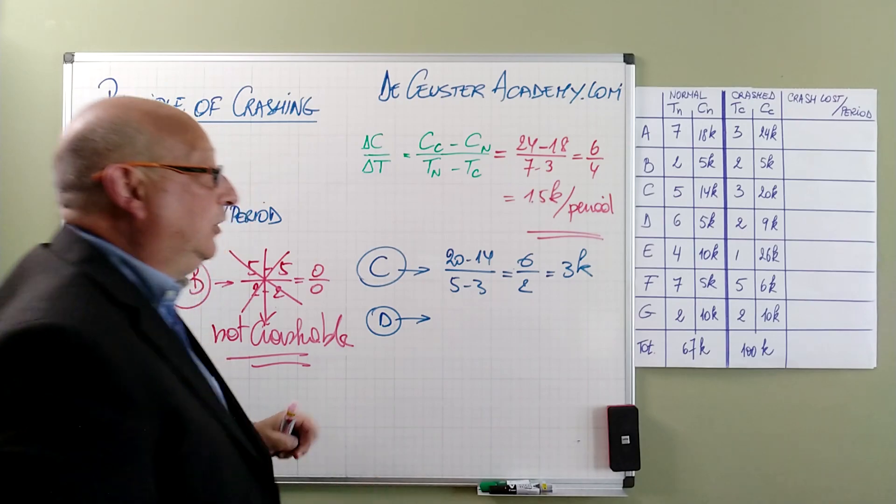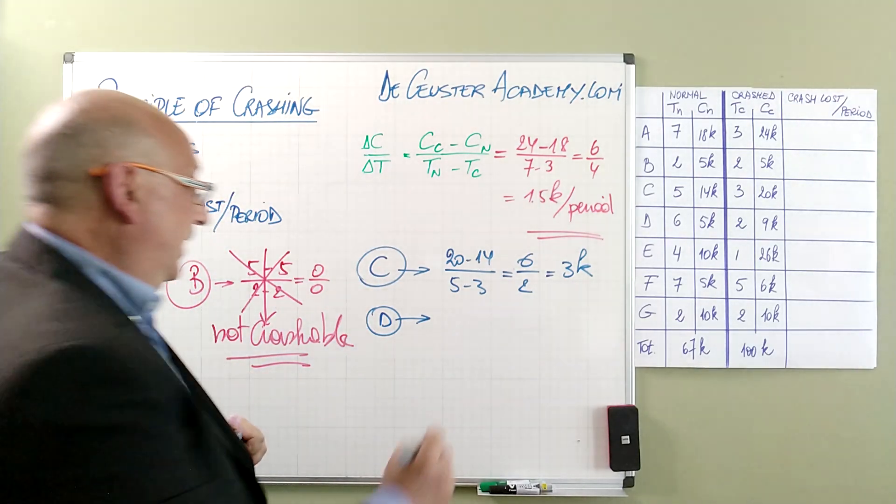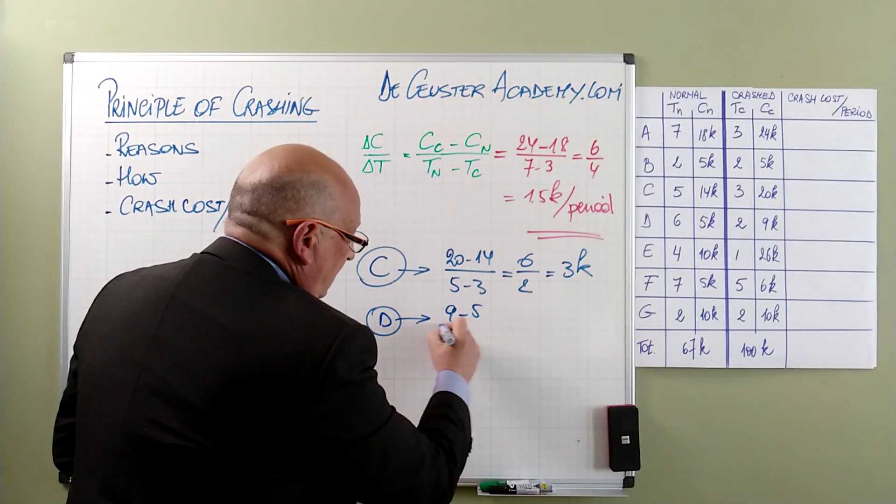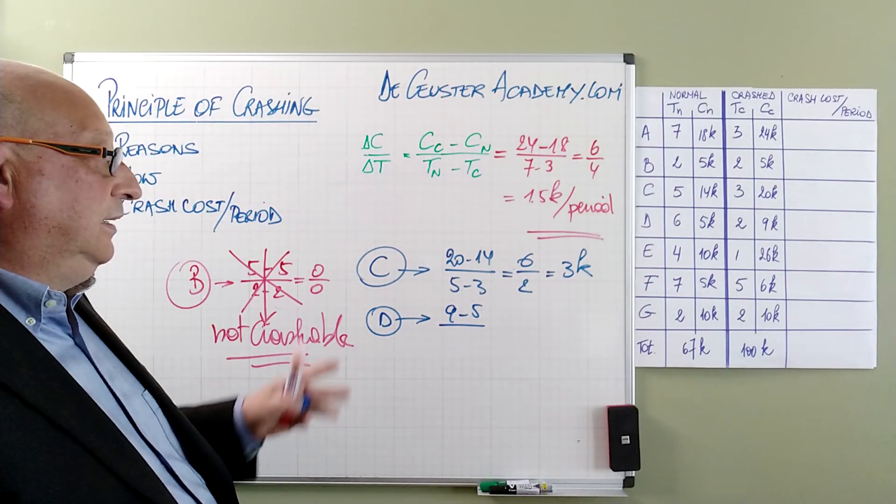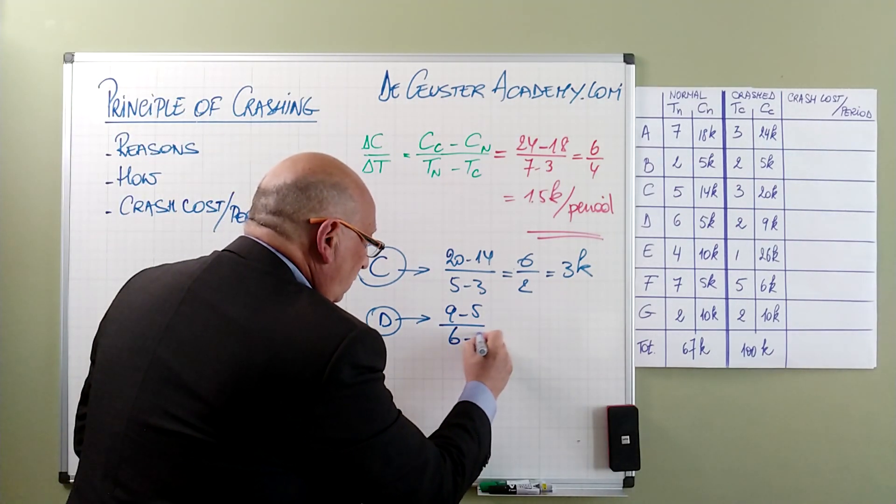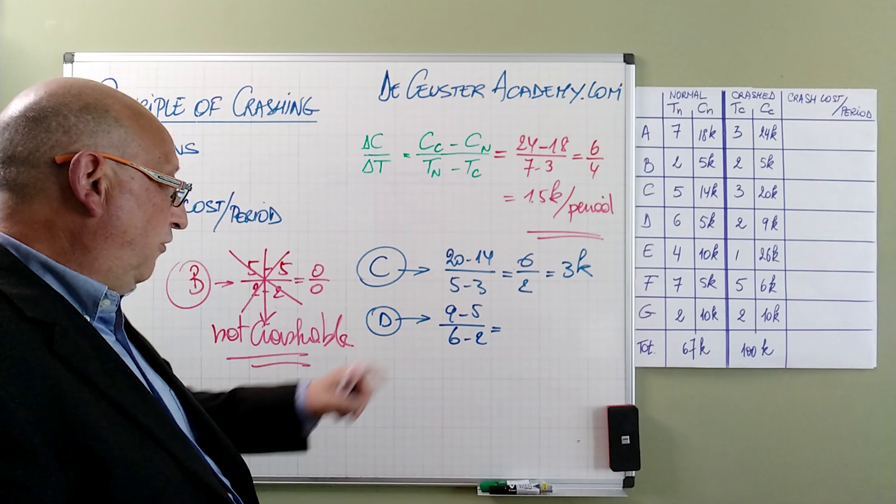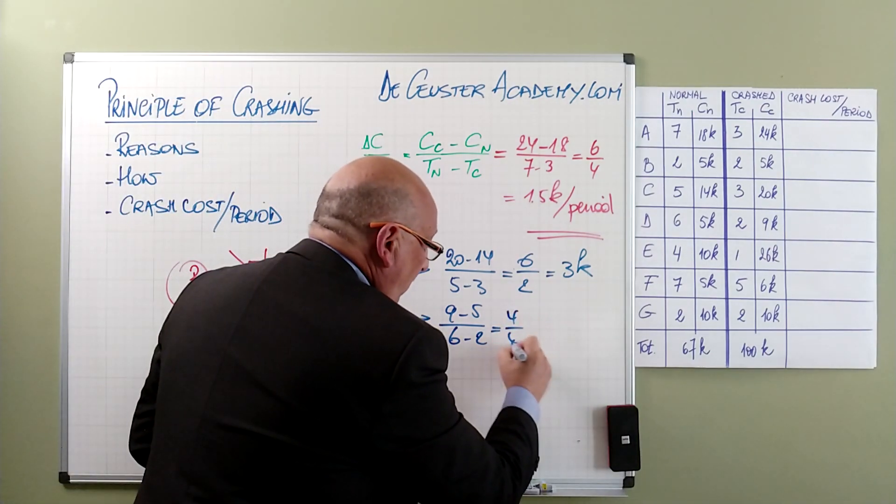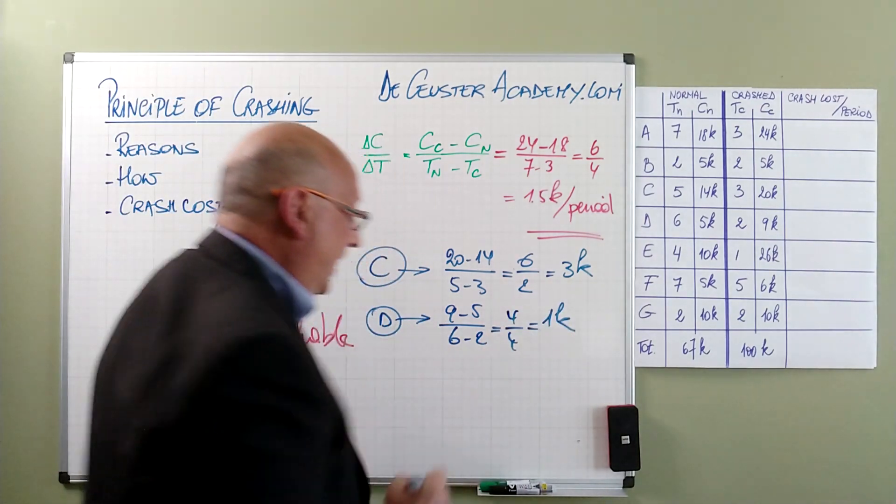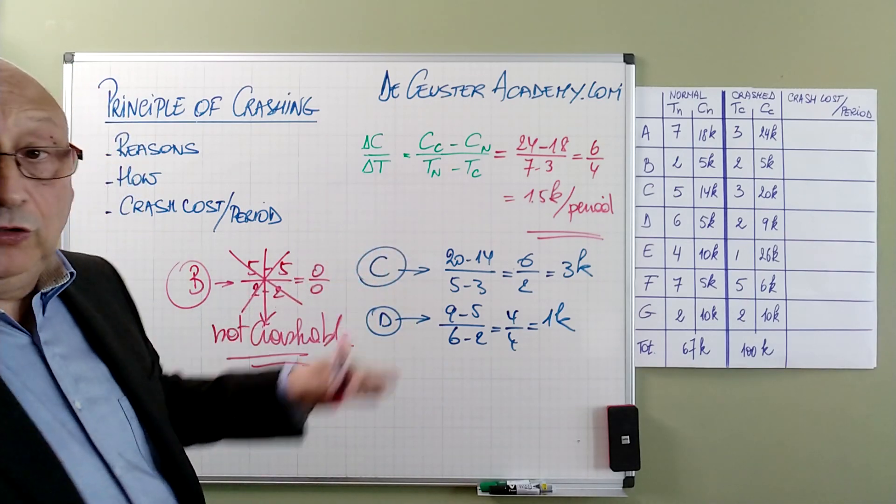We can continue that for D. For D, we find the value 9 minus 5 divided by 6 minus 2, which gives us 4 divided by 4, which is in fact 1K.